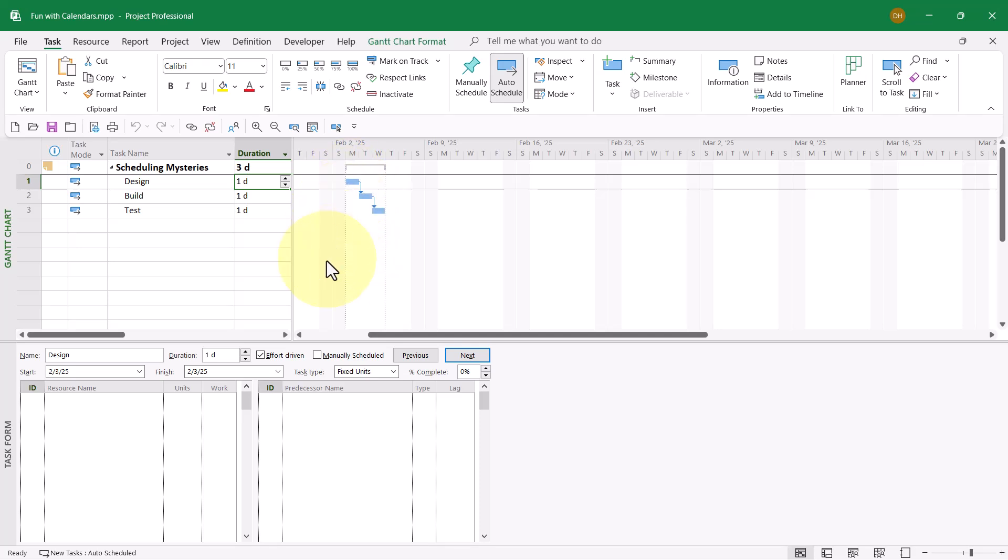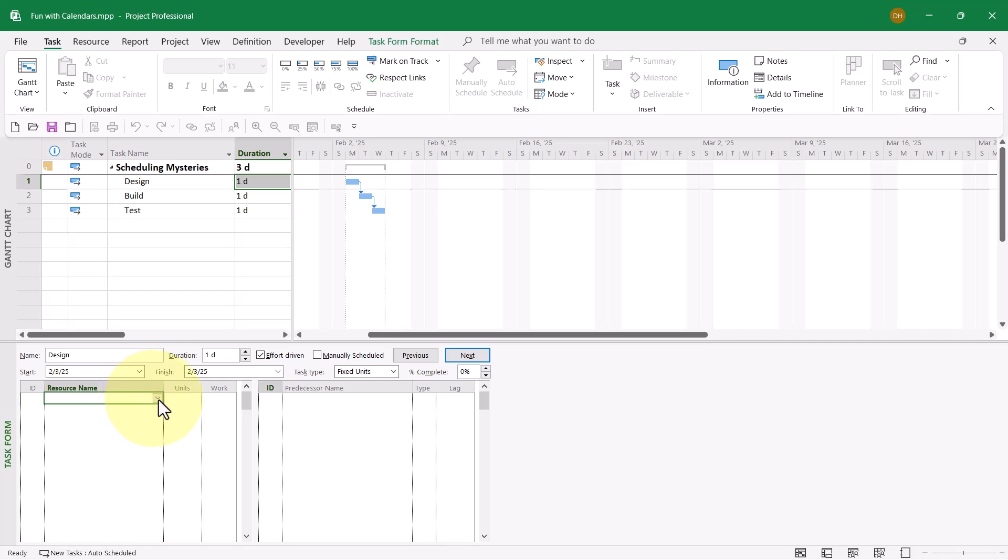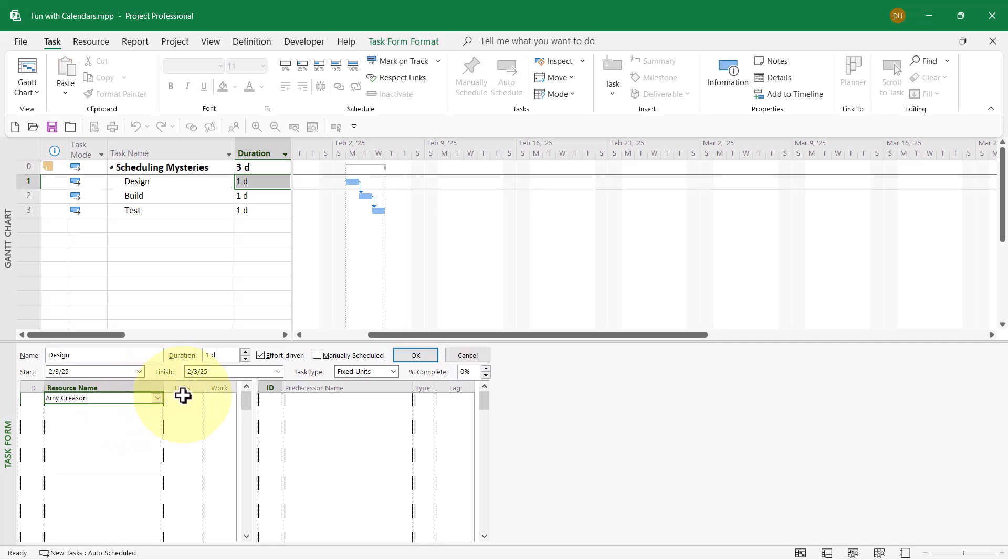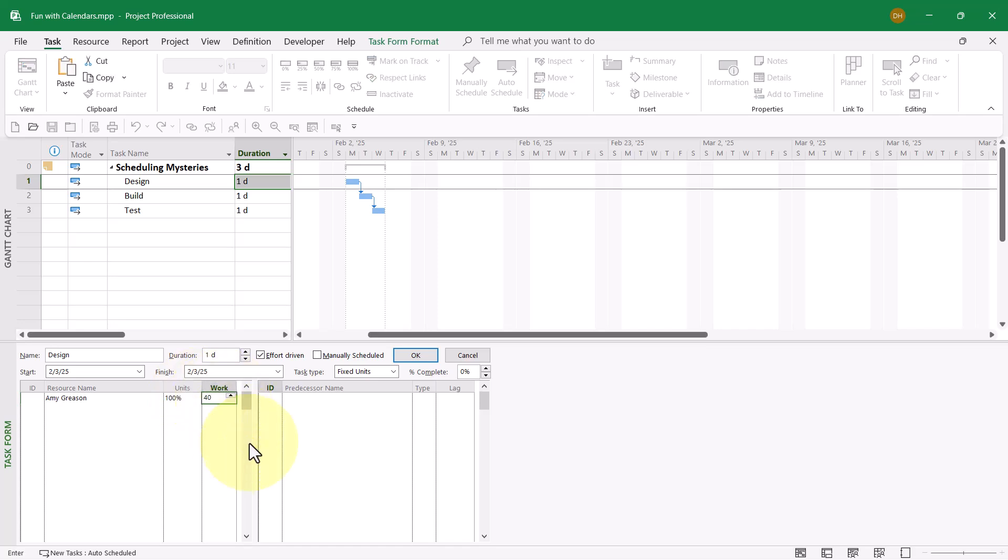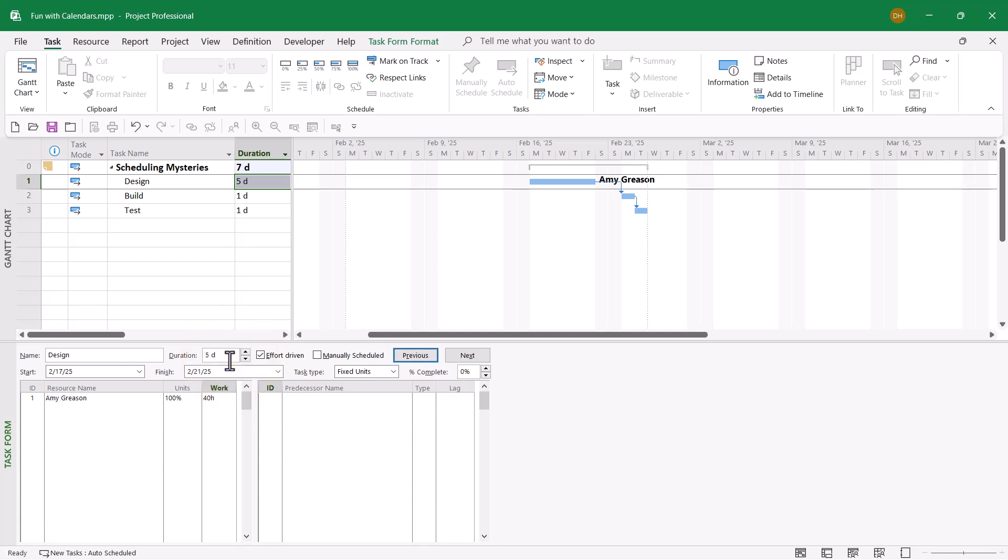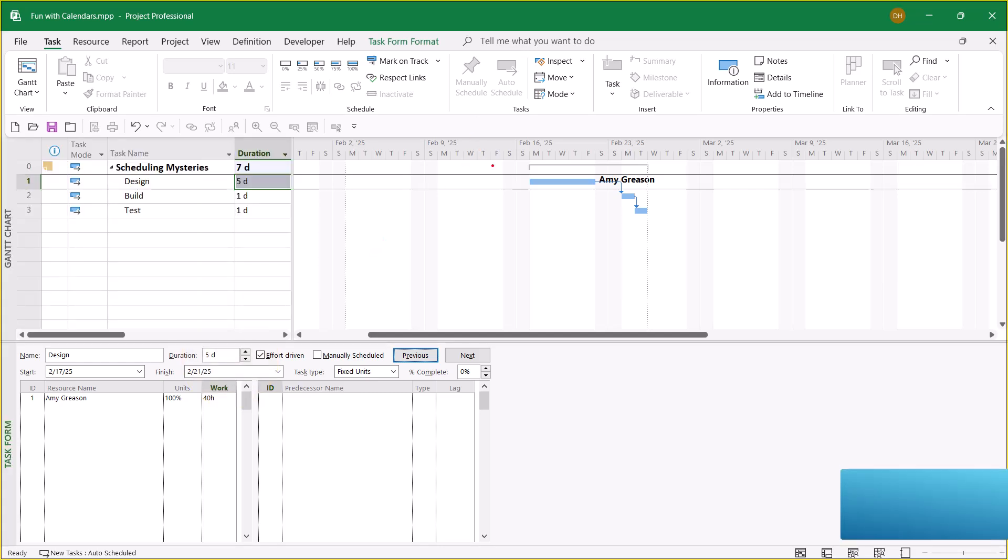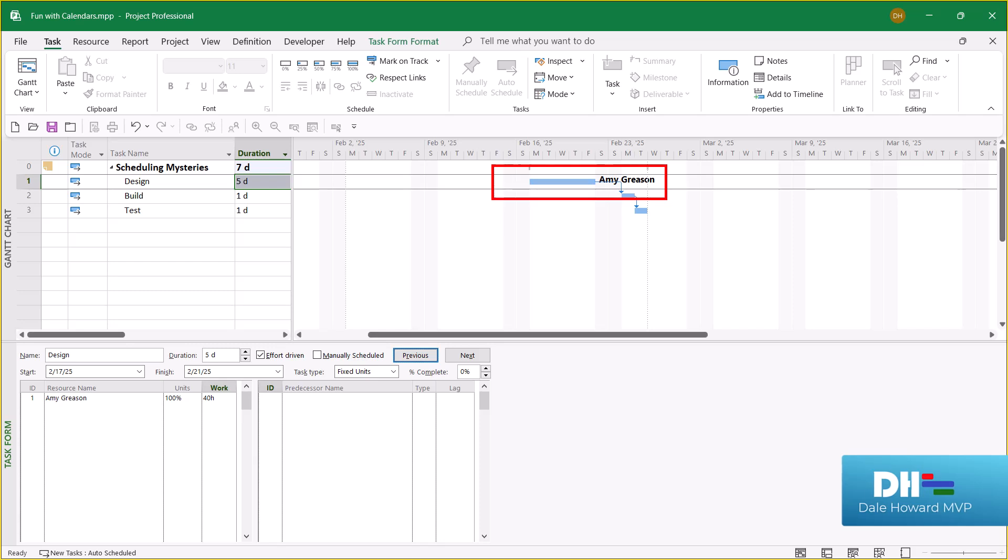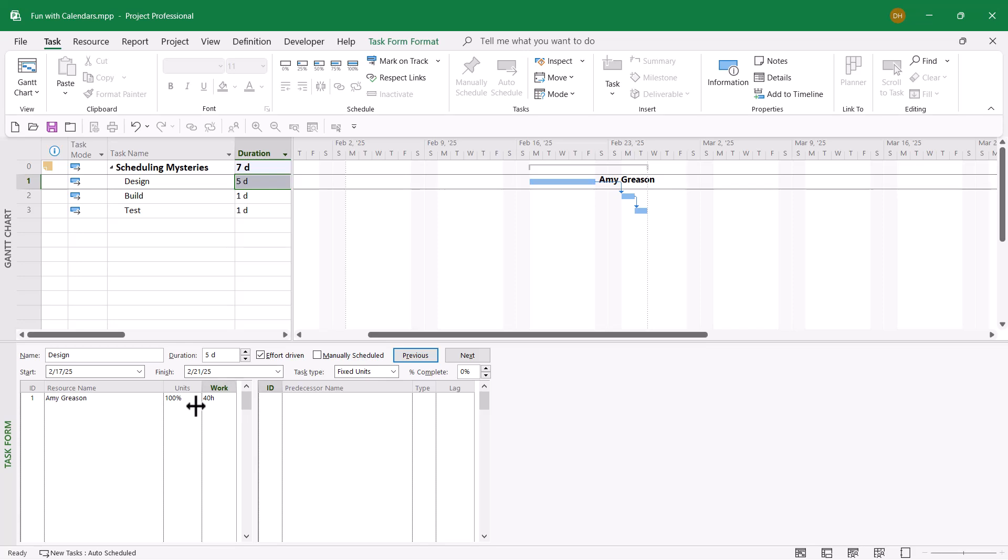Absolutely nothing unusual there. In the task form pane, I'll select the name Amy Greeson. Amy will be working full-time on this task for 40 hours. When I click the OK button, Microsoft Project calculates a duration of five days as expected. However, there's a really weird scheduling issue. Notice the task jumped from the week of February 2nd to the week of February 16th. What in the world is going on? Let's troubleshoot this issue.